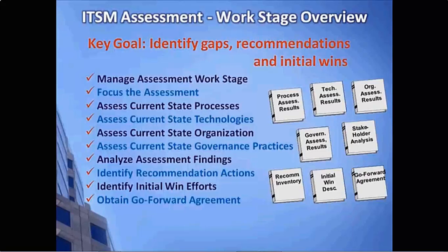We'll then analyze the assessment findings, identify recommendation actions, and then translate these to those short-term initial win efforts, and then again check in with our stakeholders and obtain a go-forward agreement to move forward with what we plan to do.